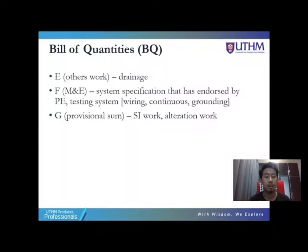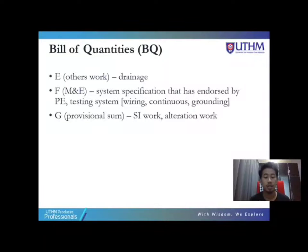Section F is mechanical and electrical. The system specification has to be endorsed by the PE. Testing has three components: wiring, continuity and grounding. Section G is the provisional sum, which covers specialist works and automation.